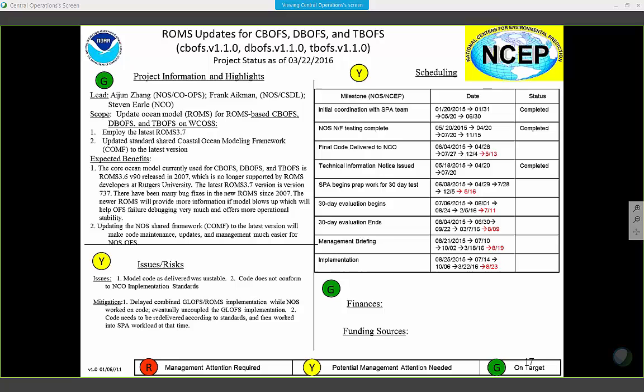One thing you're seeing with all of these implementations right now is that in the last year we did a massive update to the implementation standards. We did a big push to publicize them to everybody and to say PMB, IDSB is now going to enforce these. So it's been a lot of work for the developers. We've also set up a new structure where the models are set up so it's seamless whether they run on phase one or phase two, more from a scripting perspective. Even the Cray, it's not seamless, but there's a lot of changes we have enforced to make the whole suite more standardized and more flexible with the system we have now. It's a lot of work for the developers, and they're all doing a really good job, but you're seeing a lot of rework and a lot of delays. The good thing, like what Dave's saying, is the next time all of these come around, they've put in that hard work, and for the next round of each one, I expect our 8 weeks to be a lot shorter. Yeah. Understood.